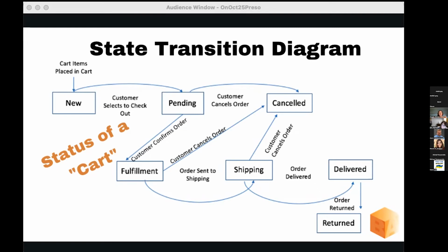Like first, we're going to deliver new, pending, returned with these user stories. Second, we're going to add in the returned process or the canceling process or more details, because pending can go into fulfillment and shipping. Really start analyzing different levels of complexity for your product, as we should be anyway. You can use this to help have those conversations and agreement.